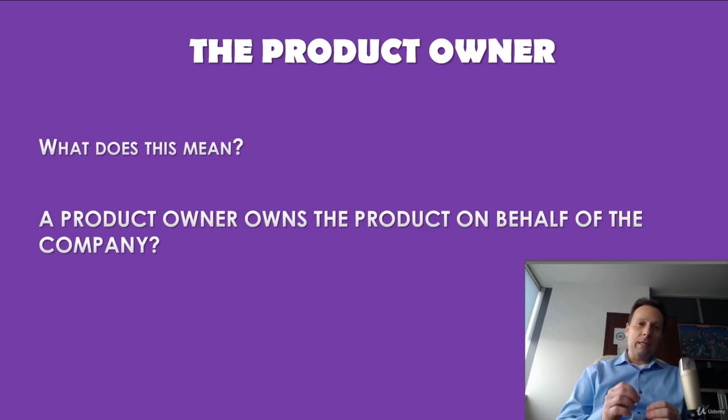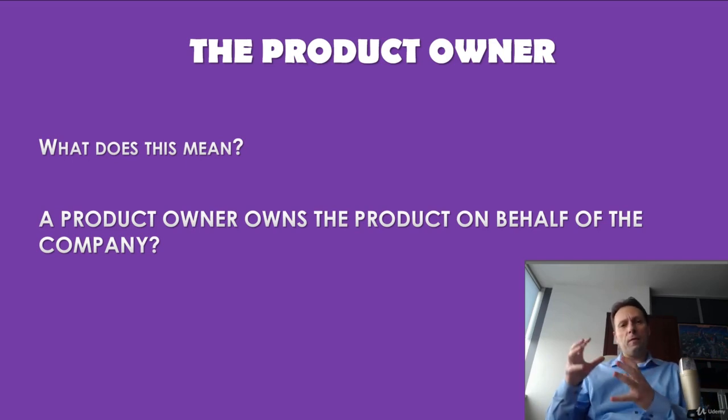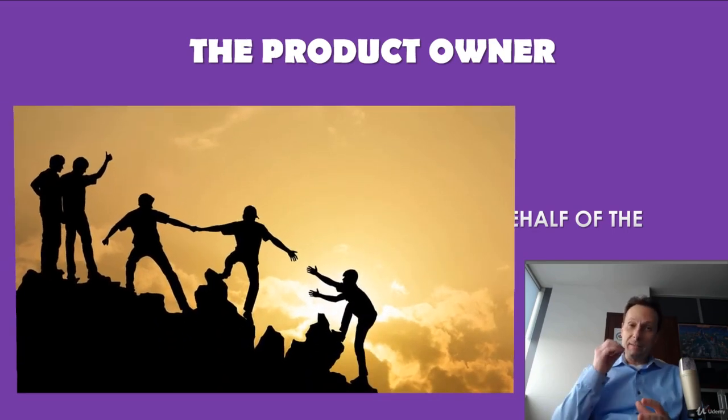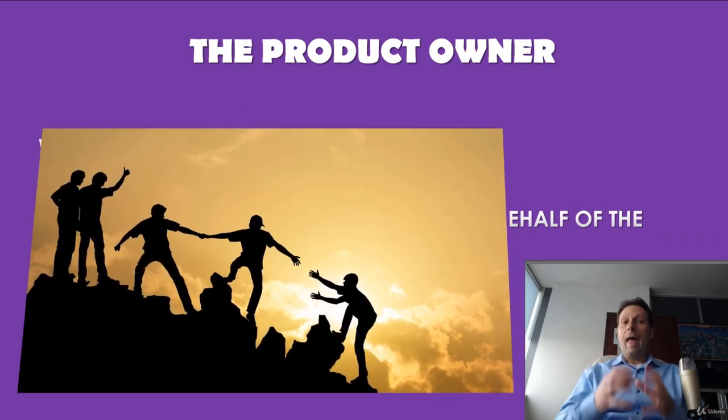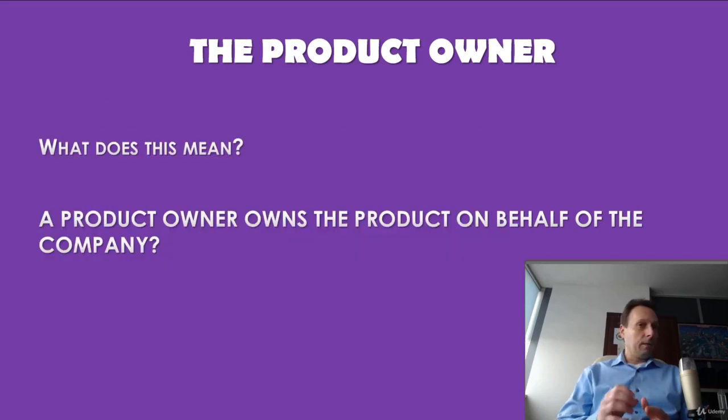The product owner does not say, "We have 4 sprints left, and therefore you must do 1/4 of the product backlog this sprint." No, this is not the case. The Scrum product owner's job is to motivate the team with a clear, elevating goal. The developers know best what they are capable of, so they select which user stories from the top of the product backlog they can commit to during any sprint.